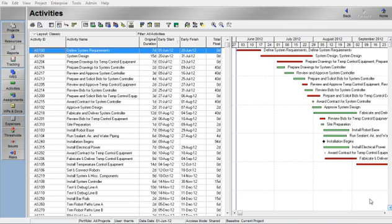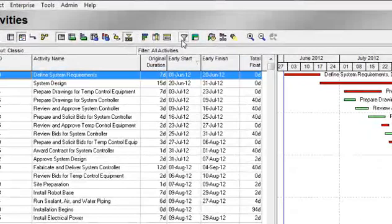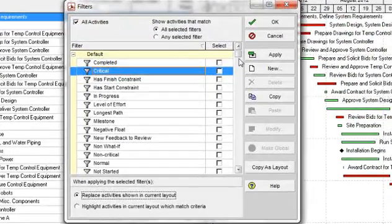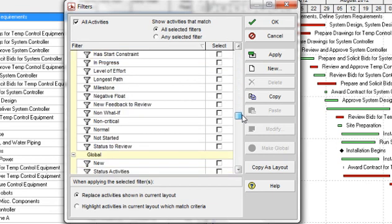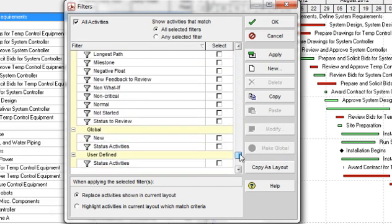Primavera P6 has 15 predefined filters. These filters cannot be deleted or modified. Critical Activities is one of these filters. The first step is to click on the filter button on the menu bar. If you scroll down, you can see the 15 default filters listed, then global filters, and then finally user-defined filters.